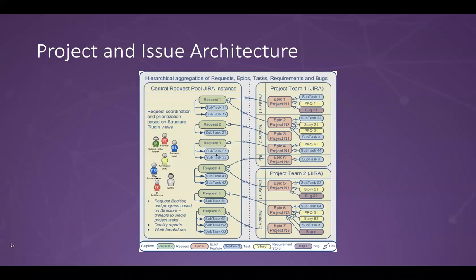And so the two things I would like to stress and recommend is that different teams have their own Jira project. It allows for a lot more flexibility for the teams to customize the way they work, but at the same time, it allows the team backlog to stay within that Jira project.